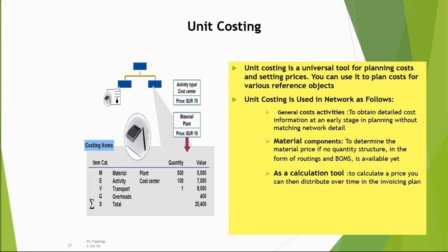Yes. You cannot capture it in any of the activity. It is a general cost. Office maintenance cost is a general cost. You cannot place it to any activity, right? Correct. And your canteen expenses also are a general cost activity. The cost will lie for the entire project. It will not get any revenue, but still you have to maintain it. These kinds of costs are all called indirect expenses. That's nothing but overhead expenses. Total cost equals direct expenses plus indirect expenses.